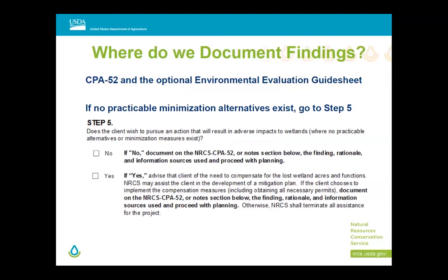So in this situation, you need to look at what we're calling mitigation or compensation. And that is very much involved typically with the Army Corps of Engineers and oftentimes state or local entities in a permitting process, saying the greater environmental benefit is installing this conservation practice here in this wetland. Unfortunately, we couldn't avoid wetlands impact. We couldn't minimize it. It's going to have an impact on wetland function. But we still think, big picture, this is a better deal because the farmer has no manure storage, and now we're going to have manure storage, and there's a lot of benefits to that.